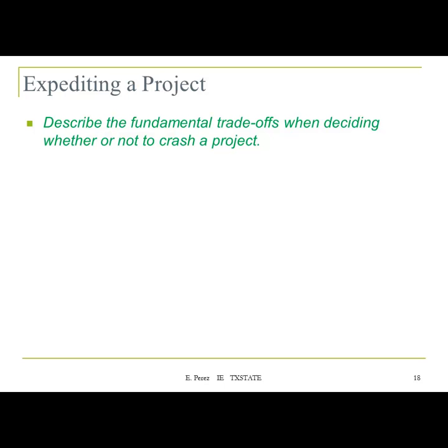I was wondering about the time, crashing it about 2 days right here. We crashed E for 2 days, which is 70, and then D for 30. If it was $40 per day, could you not crash A twice? Yeah, but if you do that, that's going to cost you $80, which is 40 per day, so that will be more expensive than 70.